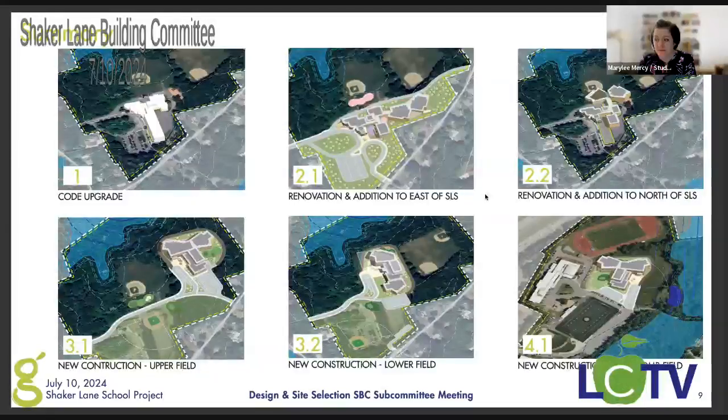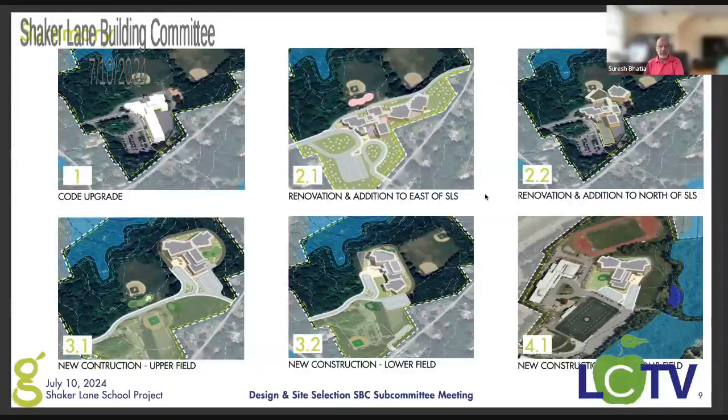Suresh, do you have your hand up? Yeah, and one more consideration would be that the cost is going to go up with the new construction at the Whitcomb Field because of the traffic, with construction restricted to certain hours when they can make deliveries. Their deliveries will be limited to after 9 a.m., after the kids get into school, because from 7 to 9 you don't want to add construction traffic to the time when students are coming in, and the same thing at dismissal time.